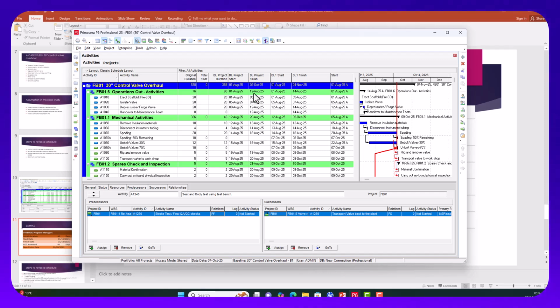Super. So this is the first baseline that we had, that started from August 1st to this. And this is the second baseline. Remember, in the second baseline your start date does not change. Your start date doesn't change. It is only the end date, because what it means is that this project started on this date and just along the line there was delay.